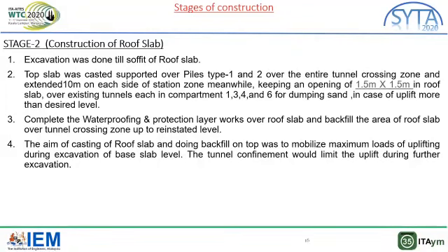The aim of casting of roof slab and doing backfill on the top was to mobilize maximum loads against uplifting during excavation of base slab level. The tunnel confinement would limit the upliftment during further excavation.